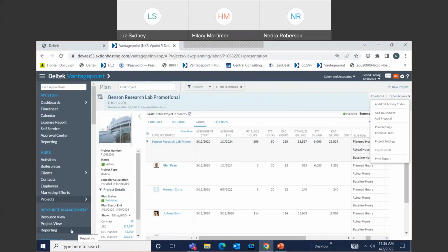And so for overhead projects, we haven't used plans for them. Do they look similar to billable projects if we were to plan overhead projects? Yes, they look exactly the same. The charge type doesn't impact this. You'll still see job to date hours put to the overhead project. If you created a company vacation plan, you'd still see job to date hours and planned hours. The charge type doesn't impact the plan.